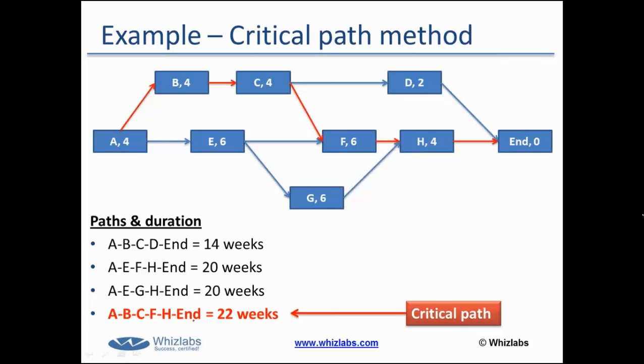We are saying that you have to closely monitor the critical path, but if this path also becomes a critical path, that means now I have to monitor this and this, two paths simultaneously. So this actually increases the risk for my project, that now I have two critical paths to monitor. If any of the paths gets delayed, my project would be delayed.